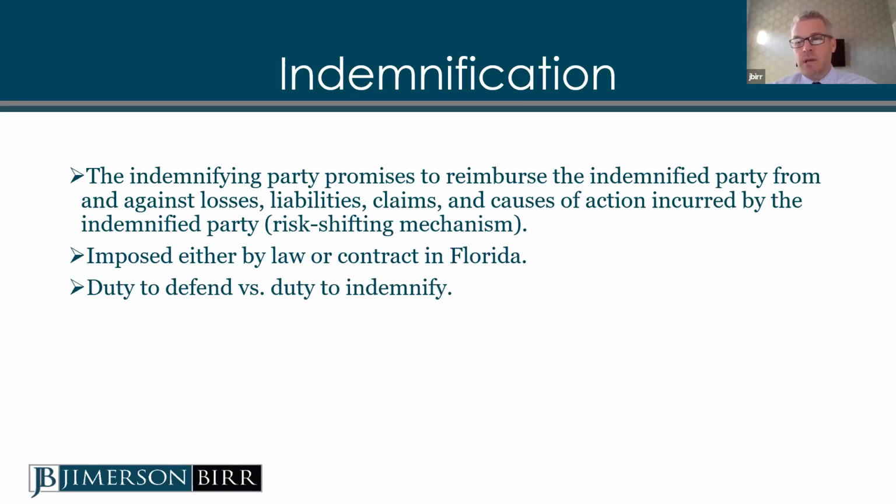But sometimes there'll be situations where a general contractor will try to hold the subcontractor responsible for problems that other parties have caused, or the general contractor has caused in whole or in part. That's a very nuanced area of the law, but it does happen. What the general contractor in that scenario is trying to do is shift the risk to the downstream parties, the folks with less leverage, and those types of agreements can be valid if written correctly and certain things are followed.